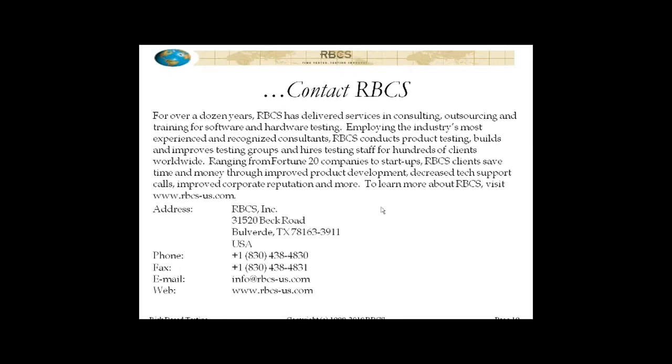Now, another thing that you might have been getting at with your question, and maybe you're getting at both, is if I run the tests in pure risk order, isn't there a possibility that I might never get to certain things? And wouldn't it perhaps make sense to have some number of lower risk test cases run earlier in the test execution effort, just to make sure that I've got breadth of coverage across the different functional areas and non-functional areas? And the answer to that is yes, absolutely.